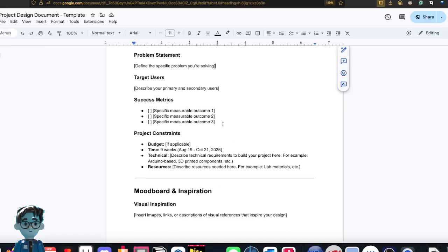Success metrics are metrics that say when your project is completed. So these are ways that you can measure if your project is done, so you don't end up doing scope creep, which is when the scope keeps changing and you never know when the project finishes. So a success metric, for example, you can say that you provide a survey to the client, and the client gives a scale out of 5 about how satisfied they are with the project. If they're saying a 3 or higher out of 5, then they are satisfied or they are happy with the quality. That could be a success metric that you can check off. So 3 out of 5 or higher with the client as a success rating or a satisfaction rating. That could be a metric.